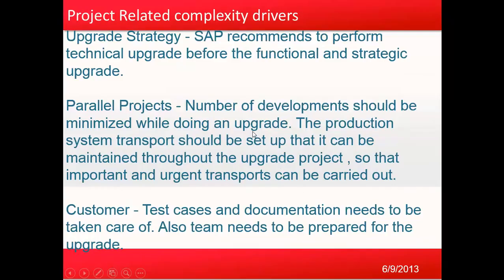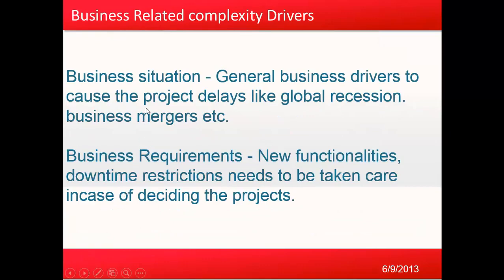Next are the project-related complexity drivers. The upgrade strategy is key — SAP recommends performing a technical upgrade before the functional and strategic upgrade. Parallel projects should be minimized; the number of developments should be reduced during the upgrade, and the production system transport should be set up so it can be maintained throughout the upgrade project for important and urgent transports. Customer test cases, documentation, and team preparation also need to be taken care of.